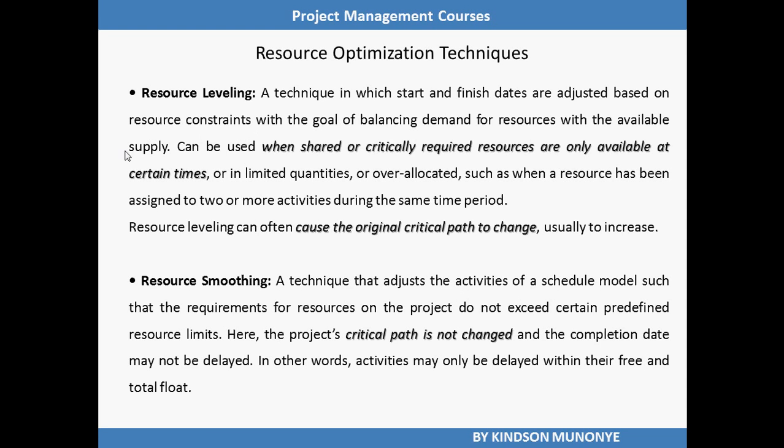Let's now look at resource optimization techniques, another important tool and technique used in develop schedule. There are two optimization techniques we are going to discuss. One of them is resource leveling. Resource leveling is a technique in which the start and finish dates are adjusted based on resource constraints with the goal of balancing demand of resources with the available supply.